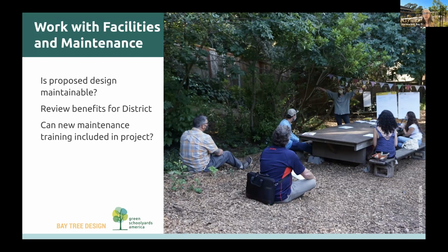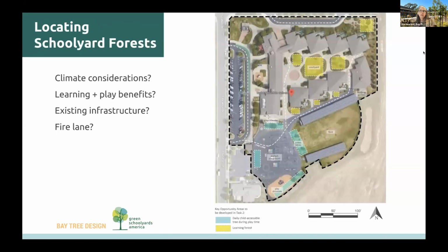So when we're working on a project, if there's something the district wants to take on and learn in terms of maintenance, we try to incorporate that into what we call our specifications so that the construction budget pays for that training. And just going to wrap up really quickly here on my part, and I'll hand it back.